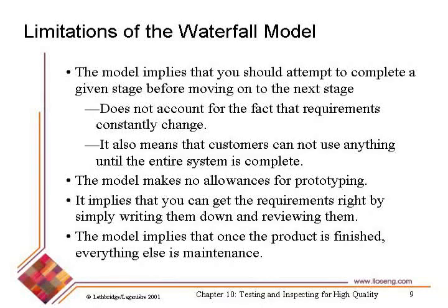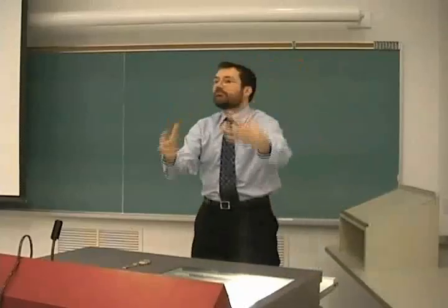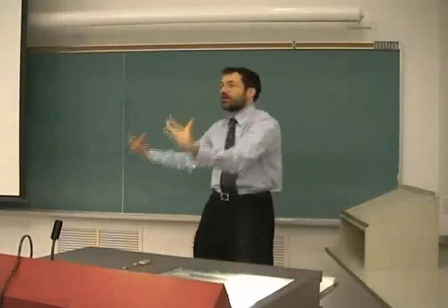And finally, and probably the worst one, it suggests that maintenance is just when the entire thing is finished and we're just going to fix bugs and make minor changes from that point on. In reality, software doesn't work that way. In reality, you have a continual process of making major changes called releases to software.